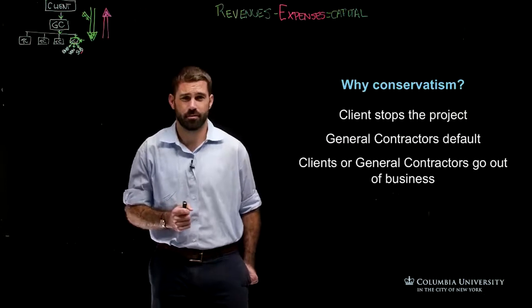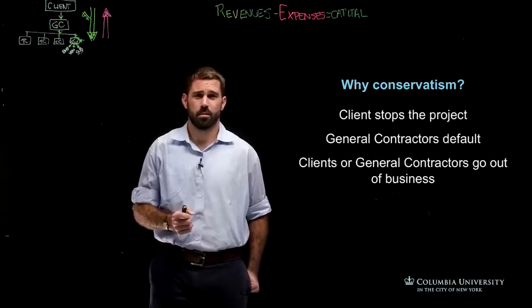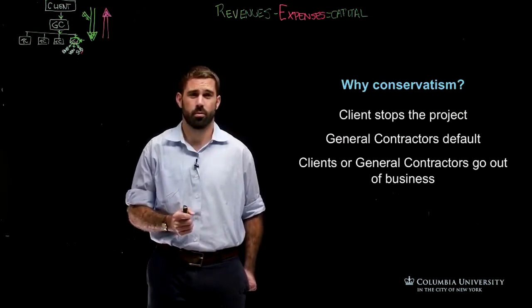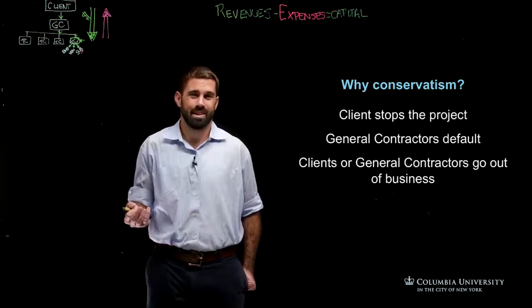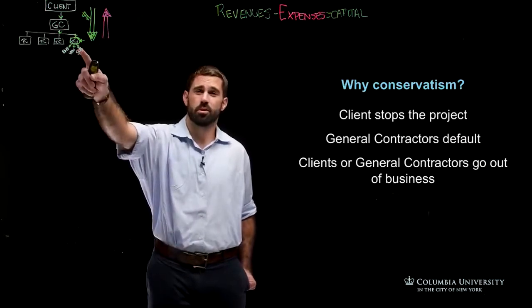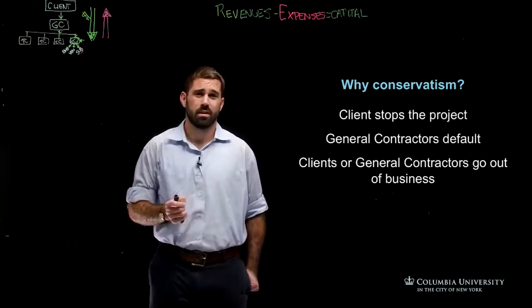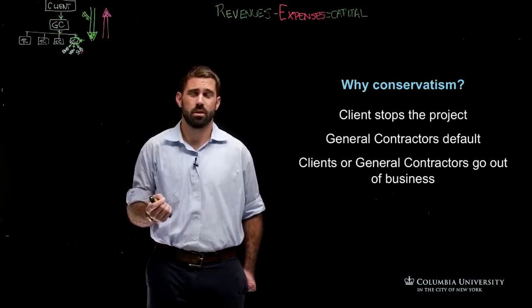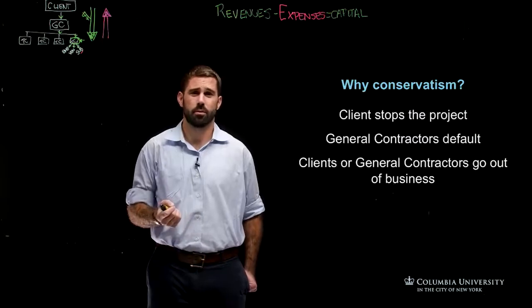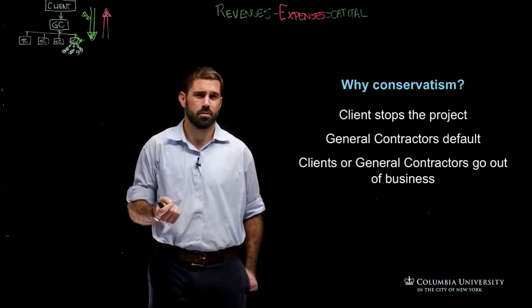General contractors might default. Gilbane is a company that has assumed large projects before, where one contractor started the project and midway through they weren't performing and they were removed from that project, and Gilbane took over. But at that point, the trade contractors who had been working on the project had to fight for all their money that they were previously owed. They had to justify that they had really done all the work they were billing for. So you might not receive all your payments if you're the trade contractor then.